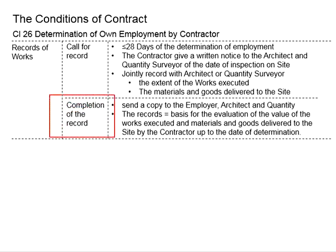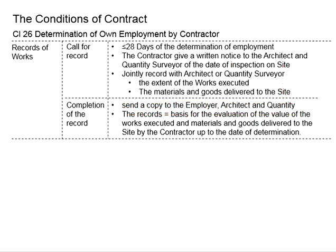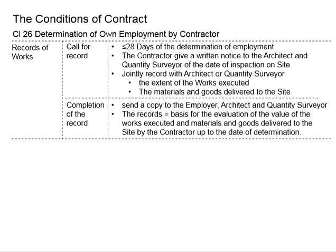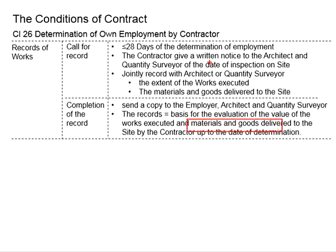The inspection should be done in the presence of the contractor, the architect, and the quantity surveyor. It is to determine the extent of work executed as well as materials and goods delivered to the site — this information is very important for the final account. Once the record is completed, the contractor sends a copy to the employer, architect, and quantity surveyor. This is slightly different from Clause 25, where the record was done by the architect or quantity surveyor. Here, the record is finalized by the contractor and sent to all parties. This finalized record is the basis for evaluating the values of work executed and materials delivered up to the date of determination.